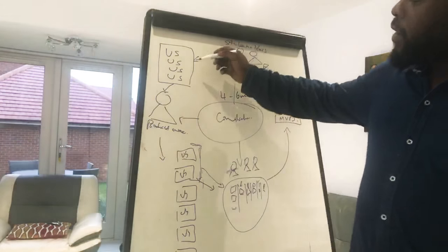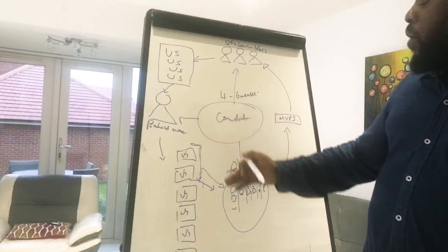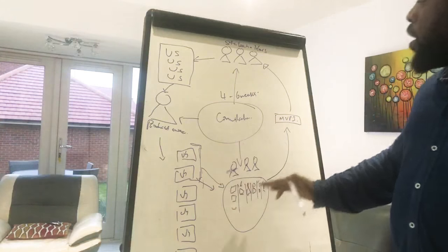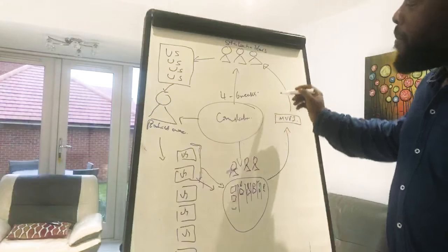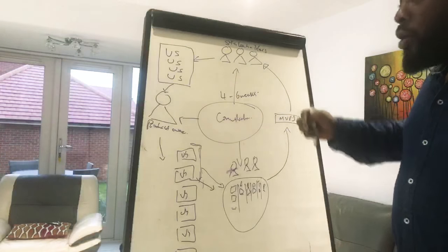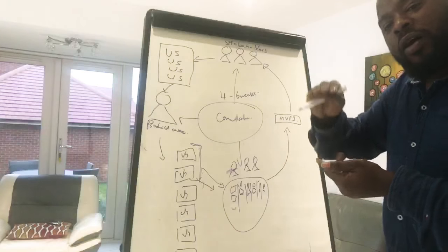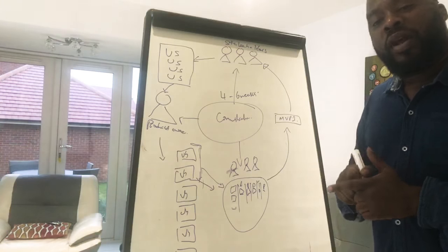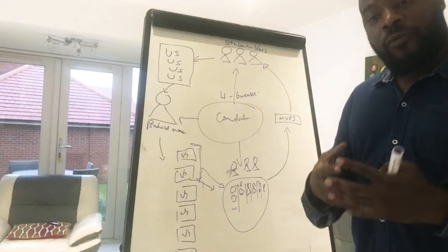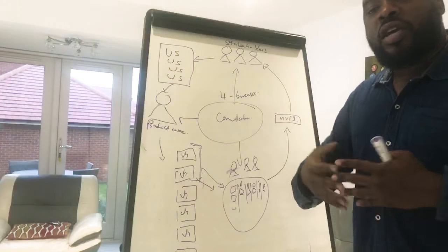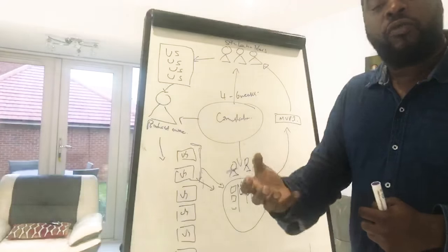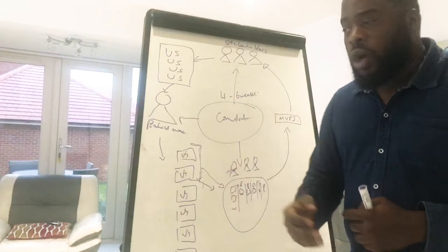As they give their feedback, the product owner reshuffles the backlog. Where he needs to make updates, he makes updates. Where he needs to move on to the next most important thing, he goes ahead and does that. And that is the repetitive development process of delivering on an incremental basis. So we build in bits and bobs and deliver incrementally, making sure that the most important thing we're delivering to that customer is what that customer needs right now, giving room for feedback, changes, flexibility and adaptability. The product evolves to end up being working software that the customer actually wants to use, which is absolutely critical for success.